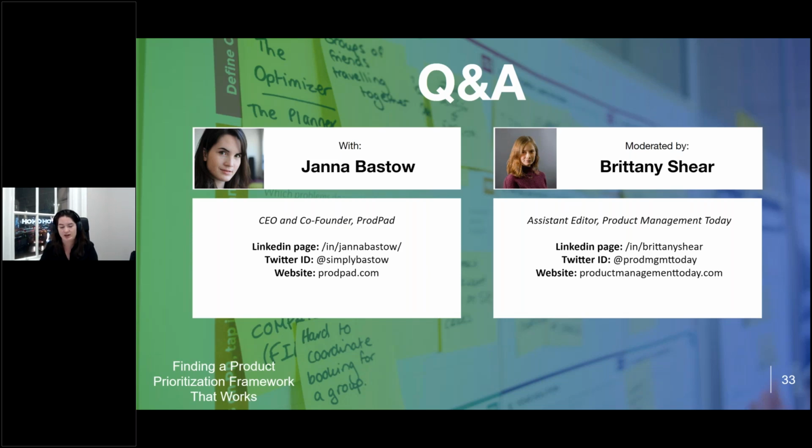A yearly hiring thing is basically saying, well, how many people are we going to need by December? And the thing with hiring is that it takes months and months and months to get each person. And once you hire somebody, sometimes they take a couple months to actually quit their job and get started with you. So you simply can't do resource planning in an Agile way, knowing who's going to be starting when and how that's going to affect your capacity. So sort of don't try. You can have rough estimates, like okay, we're hoping to have somebody in by June, and we're hoping the team's going to look like this, but adjust it as you learn more about it.